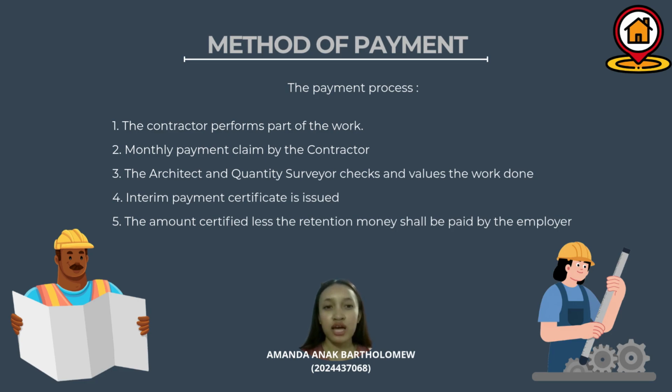The contract sum is fixed at the start of construction based on the approved drawing, specification, and bill of quantities. The contractor shall complete the project for the price agreed, save where changes are directed by way of approved variation.